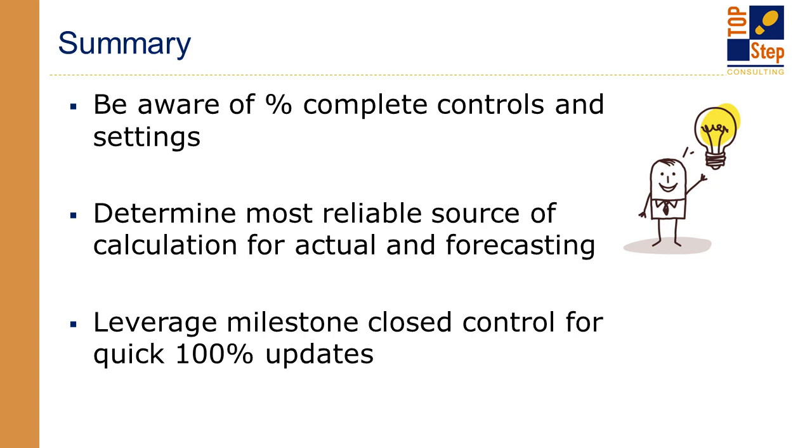And then again, leveraging the Milestone close control for quick 100% updates. As I mentioned earlier, if you've worked with us before, it's definitely something that we recommend for your milestones. Keep the hours out of them, maybe even set up a phase called milestones or billing milestones, just to keep those separate and in their nice little clean and organized area where those can be marked complete and 100% once they're finished.